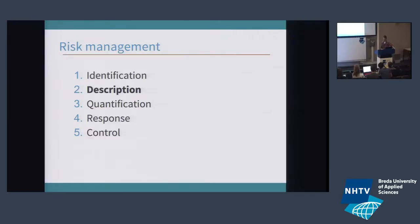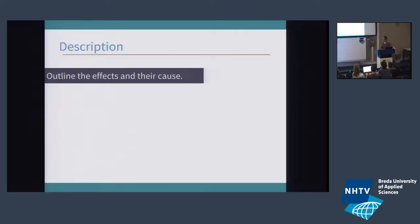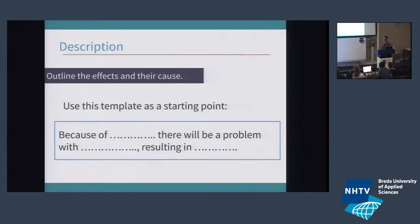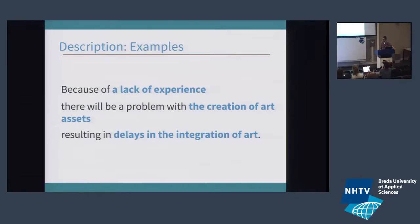Once you've identified what kind of risk it is, you describe it. There's a template for how you can do this. It's important that you have the cause and the effect. The format is: because of X, there will be a problem with Y, resulting in some negative outcome. For instance: because of a lack of experience in the art department, there will be a problem with the creation of art assets resulting in delays of the integration of art. This is an objective format of describing a risk, instead of 'art is lazy' or 'art is always late.'